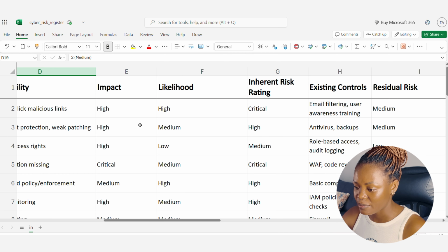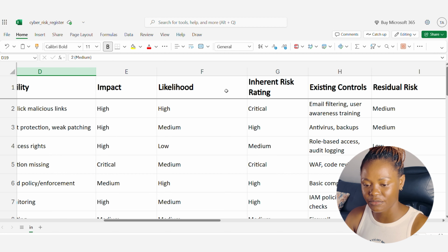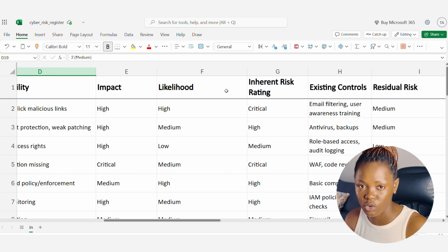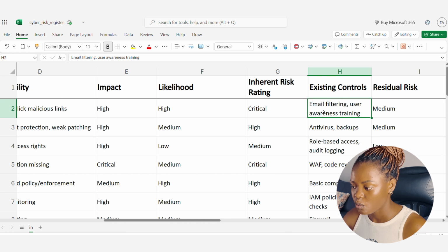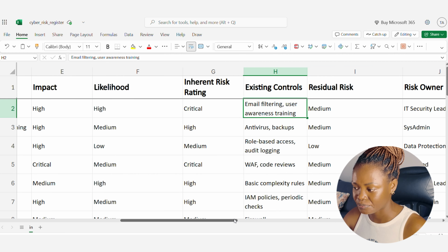With this, we are able to get the inherent risk. I was saying initially that the first risk score you get is the inherent one, and we classify it, right? Now, after applying controls to it, you eventually get a residual risk. That's the final risk. Now, in this case, what are the controls that you can apply?